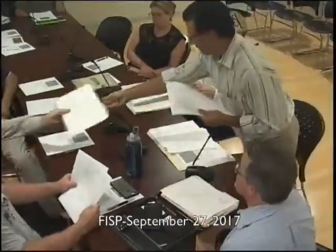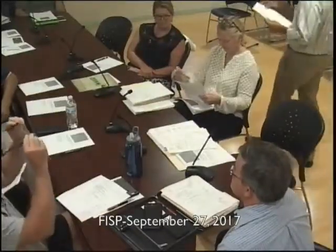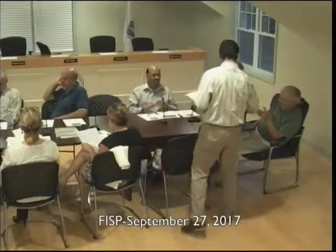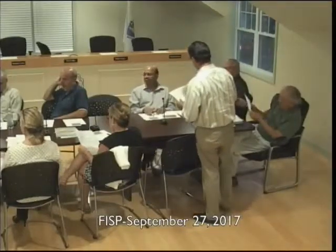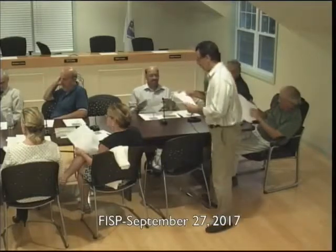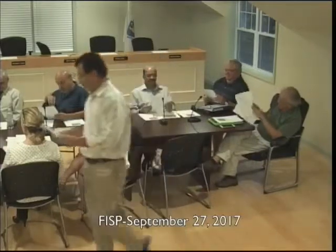John, why would it cost more than a police station, when a police station has all the specialty things? I don't really have a good answer for that, other than in the experience of this professional estimator. He knows what John Catlin's buildings are worth, and he's done lots of other similar types of buildings. And I believe for an early budget, before he has finished plans to estimate, and he can say there's 3,000 square feet of drywall, and this much board feet of lumber, he's taken some broad square foot numbers and applying them.